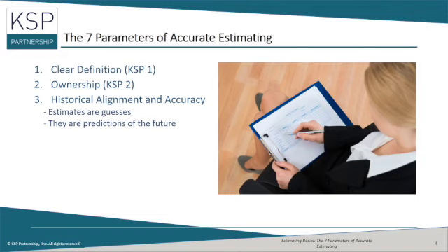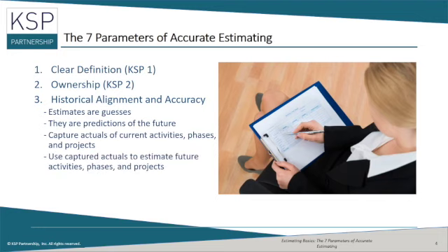I encourage all project managers and team members to record and retain the actual time it takes to do an activity, phase, or project. That way, when we do a similar activity, phase, or project in the future, we have reliable and accurate information.